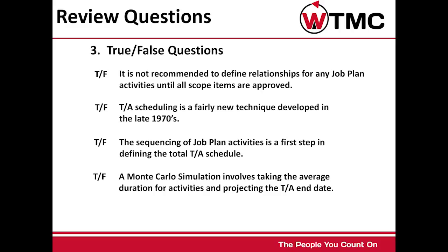The sequencing of job plan activities is a first step in defining the total turnaround schedule. If you answered true, you are correct. A Monte Carlo simulation involves taking the average duration for activities and projecting the turnaround end date. If you answered false, you are correct.